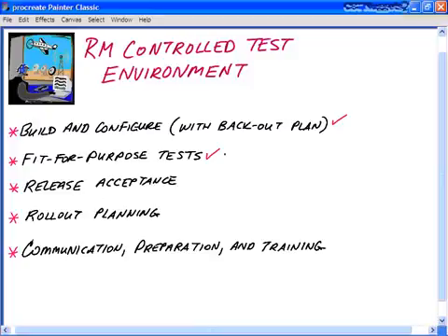Remember, the most common cause of unsatisfactory changes and underwhelming releases is an inadequate testing process. So before release, you should have a functional test by all representatives of the users and an operational test by IT administrators, IT engineers, anybody in IT who has technical expertise in these areas. Operational, functional, performance, integration expertise. So the bottom line is this: a release is going to be accepted not in production, but in the controlled test environment. And that's a key differentiation.